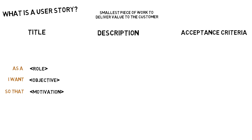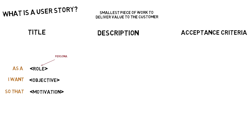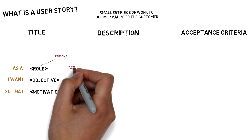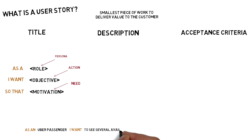The user story defines a functionality. It is expressed as a persona — the role, who are we doing this for — that is performing an action, an objective, so they can satisfy a need, the motivation. An example of a user story could be: as an Uber passenger, I want to see several available drivers in my area, so that I can choose the closest one to me.